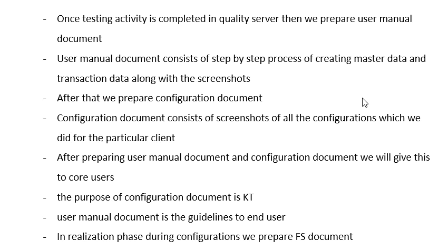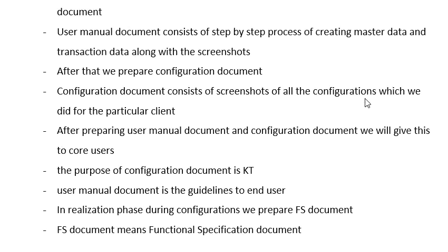After that, the consultant will prepare a configuration document. The configuration document consists of screenshots of all configurations which we did for this particular client. After preparing the user manual document and configuration document, the consultant will give these to the core users. The purpose of the configuration document is KT, meaning knowledge transfer. The user manual document is guidelines for end users.